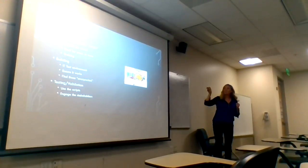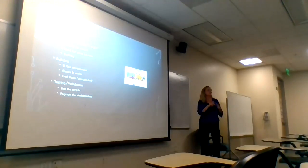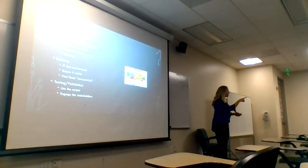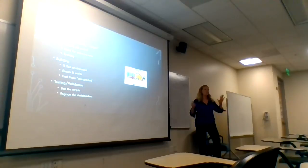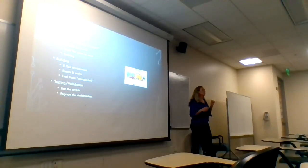So throughout the projects and throughout different things, we create test scripts. I have to tell you, this is my least favorite thing because it is literally stepping out every single step and click. And not only that, it's, okay, click on this. And then what's your expected outcome? When I clicked on this, a window opened. Did it pass or did it fail? For every single thing. Oh my God, I get so bored doing those. So that's just me. Some people really love it. But it's so crucial because you can use those scripts for years to come.